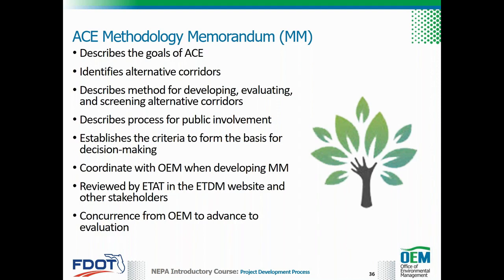The district project manager first coordinates with OEM when developing the methodology memorandum. Subsequently, the methodology memorandum is uploaded into the EST so that the ETAC can review and comment. After the methodology memorandum has been reviewed by the ETAC, the district revises it as necessary to address any comments received before sending the document to OEM for review. In certain situations, the methodology memorandum may need to be reviewed by the project stakeholders more than once.